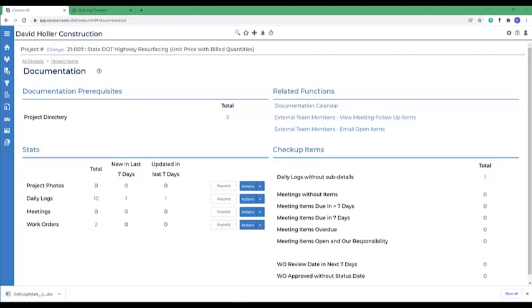information. Daily logs can also be reviewed in a claim or legal proceeding by the opposing party, so it is important information is recorded accurately. Two reminders. First, remember that companies and contacts that you're going to be referencing in a daily log should be added to the project directory.